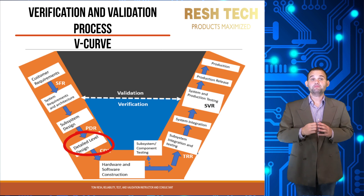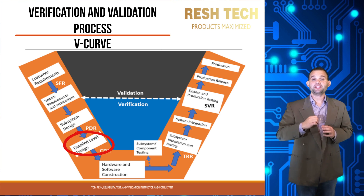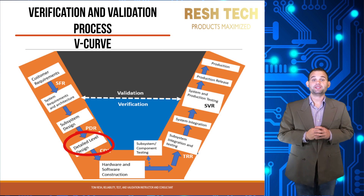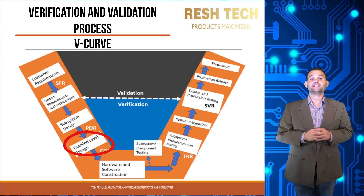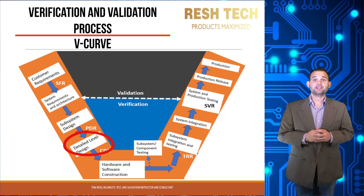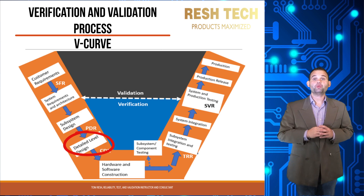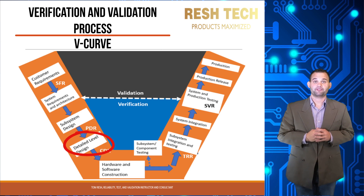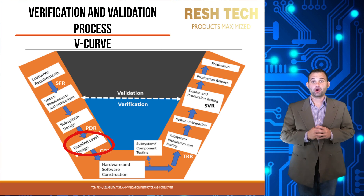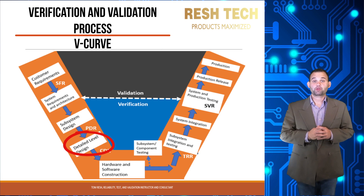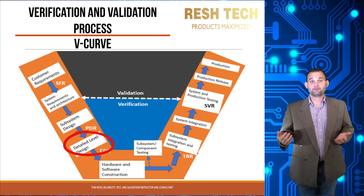The next step is the detailed level design, where components are selected to meet subsystem functional targets. Reliability engineering should assess component reliability data supplied by the manufacturer or supplier. If no data exists — for example, for a new technology — the reliability engineering team will need to conduct their own reliability testing as part of the development process. This can be tricky and time-consuming, and typically the component will be integrated into the design before testing is completed, making it a technical and program risk decision.